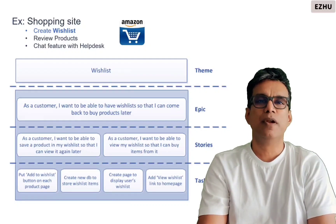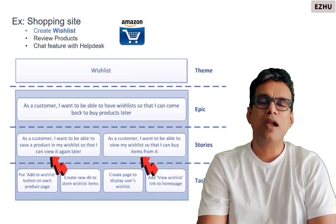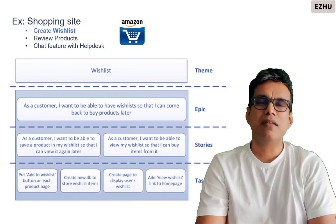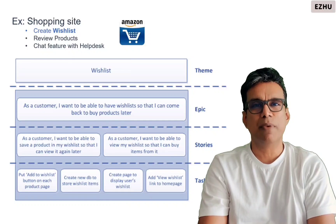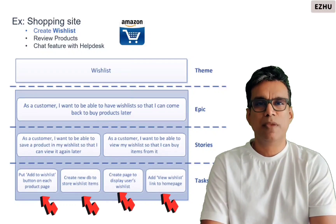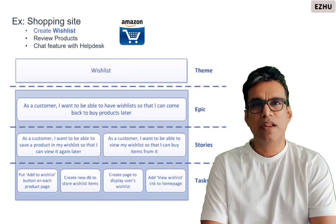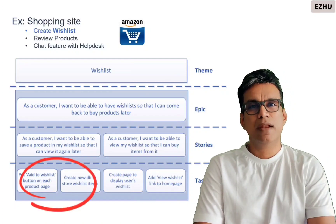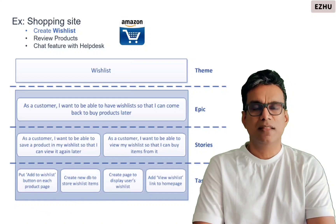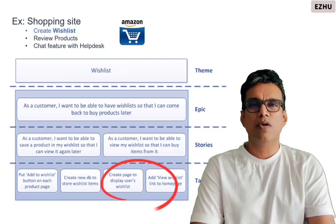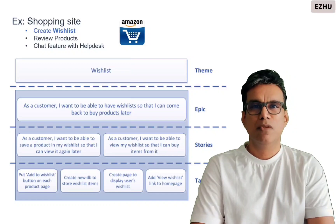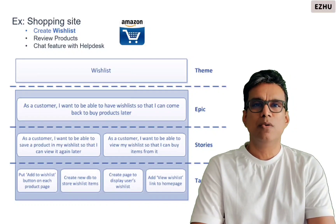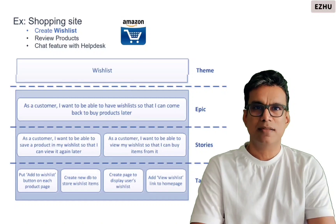This epic can be further split into stories. The first story is: able to add products into the wish list. The second story is: able to come back, view it on a later date, and then purchase it. Each of these stories can further be broken down into tasks. For the first story, I need to create a button to add the product and a database to store the wish list items. The second story breaks down into creating a wish list page and adding a link on the home page.